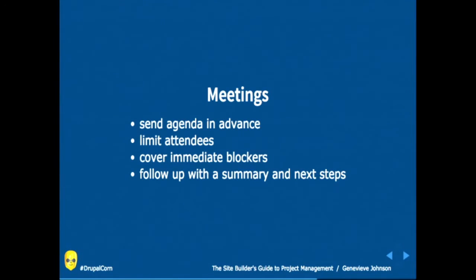I was in a meeting with a client who very clearly said, I want you to make me a theme that has a giant video that automatically plays in the background that fills the entire homepage. Okay, great. So I went back to my desk, made a quick little theme that had a giant background video on the homepage, sent it off to him, and he's like, nope, I didn't ask for that at all, don't want it, not what I said. Well, it was, to me, very clearly what he said, but because I didn't send him notes, there was nothing to document what I heard or what he thought he had said to make sure that we were really on the same page after we left the room.